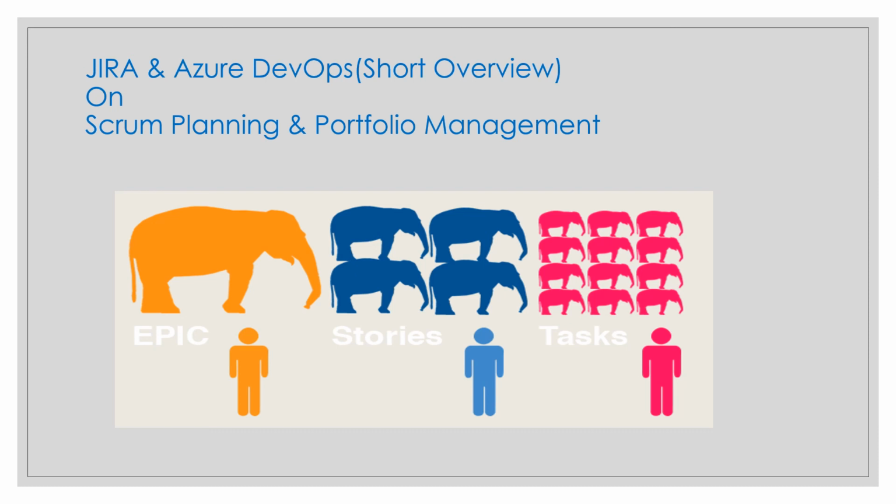Okay, so the next step, when you are working with the work item, will be managing the sprint and the capacity, how you will do it in Azure DevOps, and the reporting and tracking the chart. So your team builds the sprint backlog during the sprint planning meeting, typically held on the first day of the sprint. Each sprint corresponds to a time box interval which supports your team's ability to work using the agile process and tool.